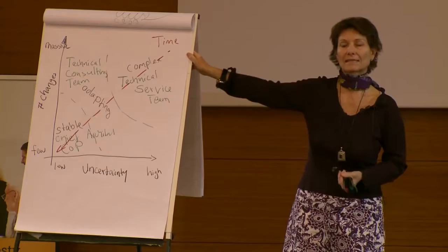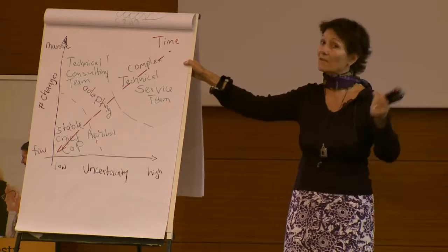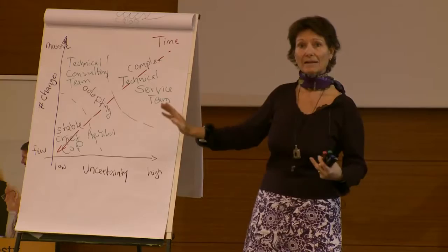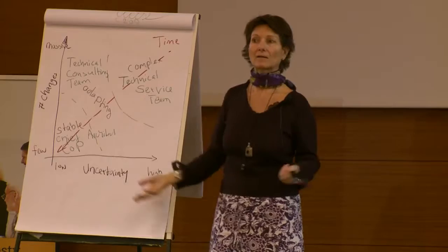So most often it's the same people, the technical service team people. We don't need all of them anymore. Maybe we only need three of them anymore, or five, or whatever. And they provide consultancy service whenever a team needs that. And then if we are even getting more stable, then they become just regular team members and are part of every normal, regular feature team.